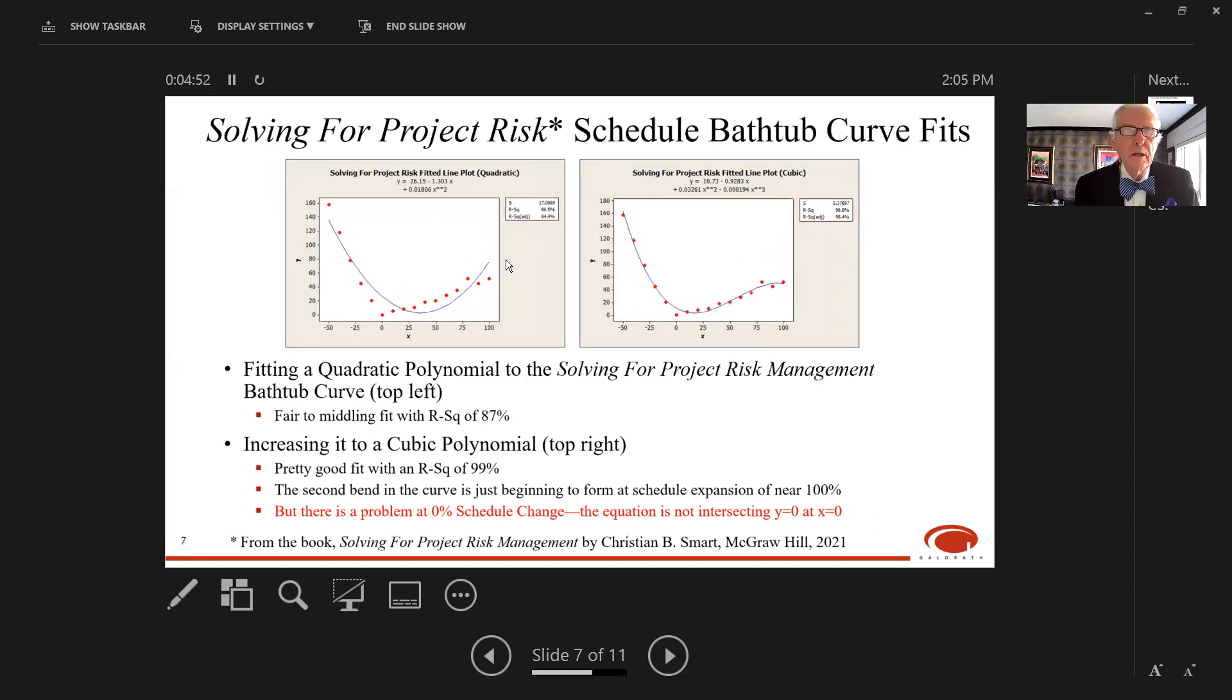Let's do the same thing using the curve from the project risk book. I tried a quadratic polynomial, getting slightly better results with R squared of 87 percent. But we can do better with the cubic polynomial, which gives R squared of 99 percent and fits the data points very closely. Again, we see a second bend in the curve at schedule expansion near 100 percent, but as long as you don't go out in that territory, the model does pretty well. There's that same problem of zero percent schedule change not yielding Y equals zero.